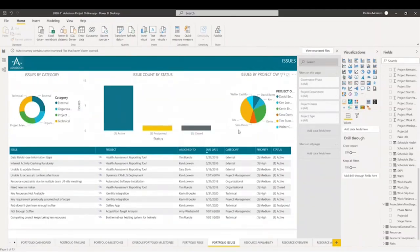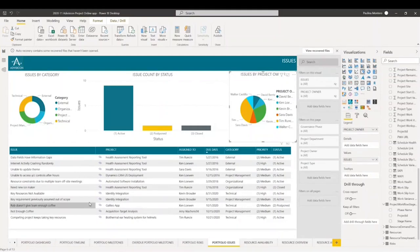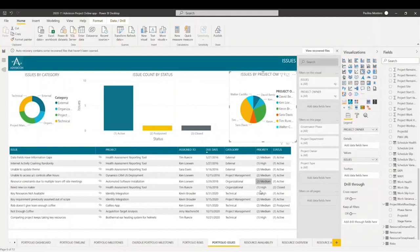Next up, we have portfolio issues. These are aggregated issues across reports. Because issues are immediate project challenges, it is very important that they're highly visible to allow management to understand the nature and impact of the most critical issues. Project issues having senior management visibility helps ensure that all issues are resolved before they impact the project success factors. We have issues by category, issues by status, issues by project owner, and a table with a quick overview and data on each issue displaying the issue title, the project it corresponds to, who it is assigned to, due date, category, priority, and status.